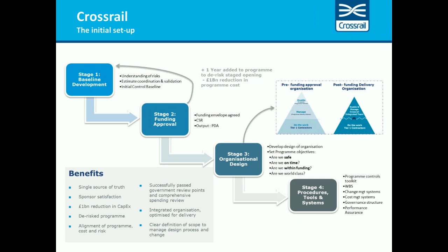We also had to produce a detailed estimate. This took various iterations and required working with all of the different framework design consultants, of which we had about 19. We also had to do the detailed QRA, produce an assumptions register, agree the exclusions with sponsors, agree the Network Rail deliverables, as well as the scope for Canary Wharf and Berkeley Homes, as well as defining our work breakdown structure. I'll move on to stage 2.